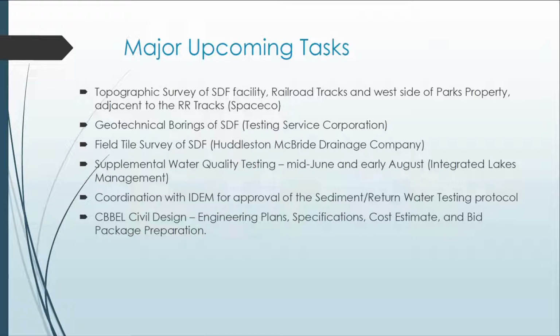We're going to coordinate with IDEM. When we dewater that sediment, we have to release that water out of the basin and have it drain back towards Cedar Lake. They want to make sure that water is clean. And so we're going to come up with a testing protocol that they'll approve, and that will tell us how we treat the water as it goes into the basin and out of the basin.